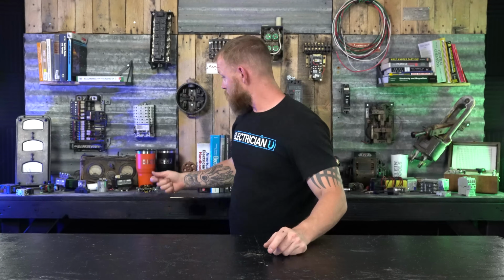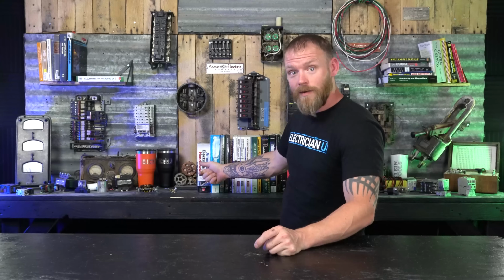Final meaning everything's done. There are some jurisdictions that are going to want you to have the power on for them to inspect and do a final inspection, because they want to flip light switches on. They want the whole building working so that they can truly do a final inspection that makes sure everything works. And they're going to stick their plug tester in, and they're going to trip the GFCI circuits and make sure that everything's GFCI protected.